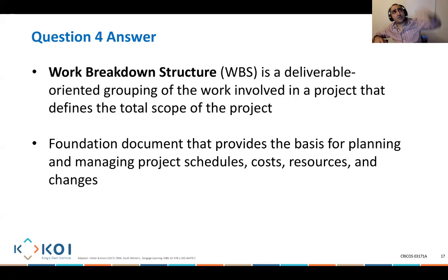You create the structure, main things, sub things, sub things, and then you talk about the activities. You assign people to activities. You assign start dates, end dates, budgets. Without that, guys, you won't be able to go and really get the required information. So don't create a budget, don't create a cost, don't create a schedule before you really go and spend the time to think about all the activities that are needed, and start thinking about assigning people, start thinking about how long those activities would need, to be able to name a few things.